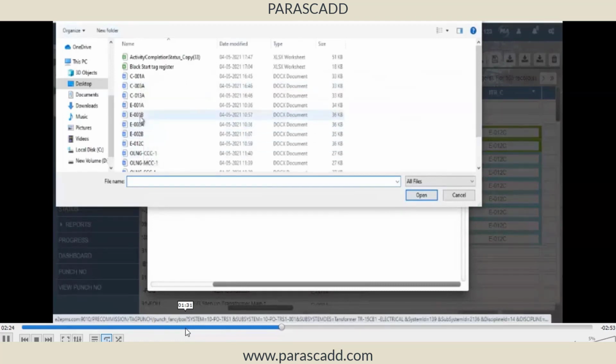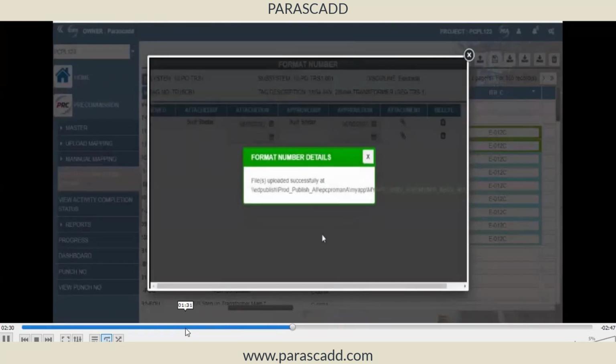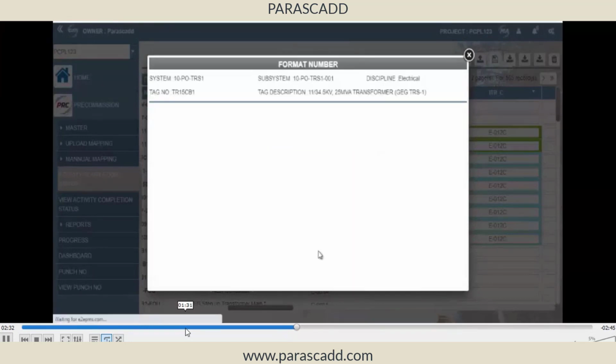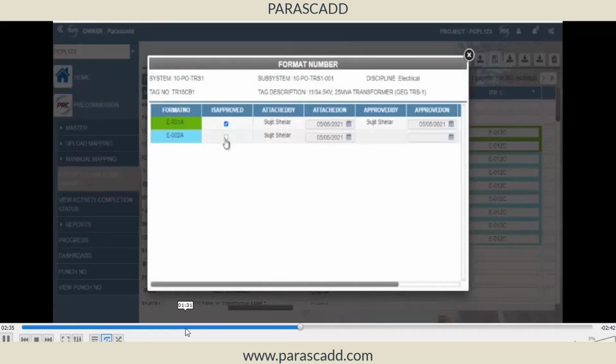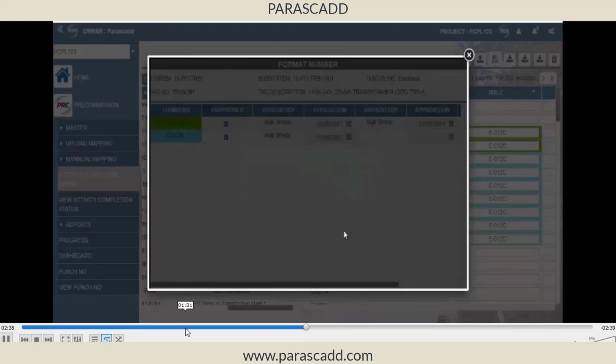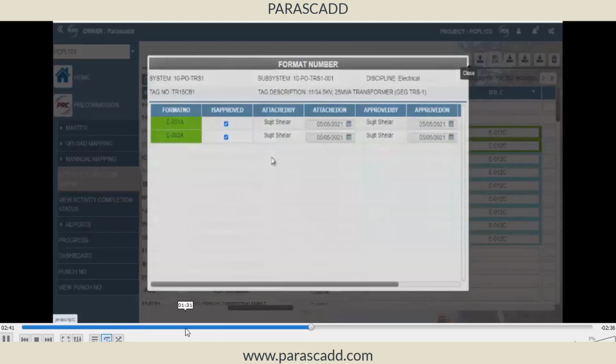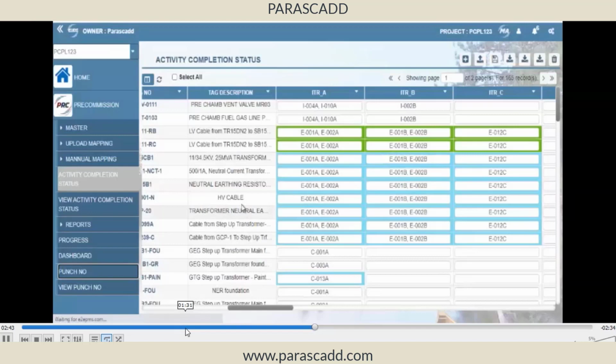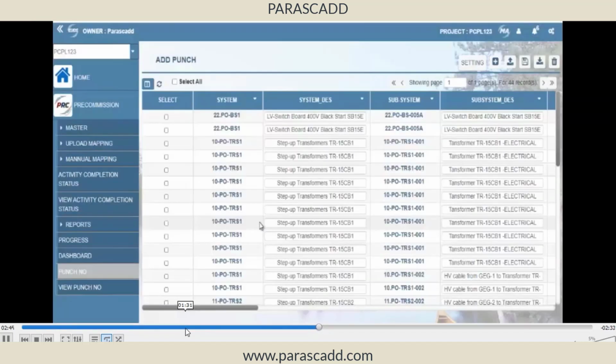As a consultant or a contractor, I will take signature and then I will attach the attachment. That will be cross verified by the inspector in the software and then he will give clearance. Because a system will not understand the attachment, whether it is a right attachment or not. Even I can attach my photo as an attachment and then say okay. So the system will not know whether you attached the right one. Once it is attached, it is in blue color and not yet approved.